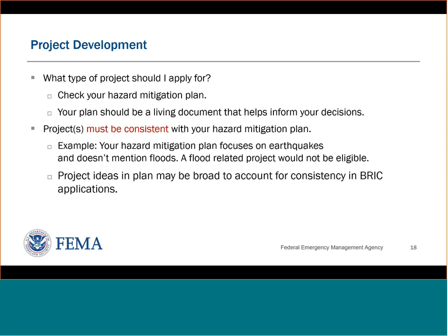So your projects have to be consistent with your hazard mitigation plan. You don't necessarily have to have your project specifically identified, for example, we want to elevate these 5 structures in this specific cul-de-sac because of flooding. But your hazard mitigation plan has to at least address the flooding hazard before you can apply for